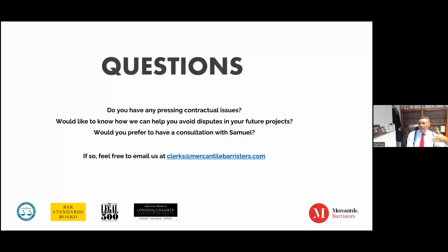So the primary answer to your question is that you look at the construction program at the outset. Often you don't get to see all of it. You're given a time scale: we need you to do this between the 1st and the 15th of June. You accept it because it's a 2 week delivery and fitting period. But by the middle of May, please go to site, take a look. And if it isn't ready, that is when you start screaming, because someone will turn around and want to blame you.